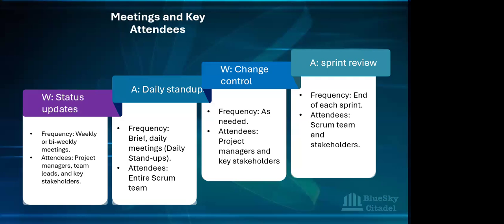That's the difference between Agile and Waterfall. There isn't a set time box for status updates. I've been on some meetings that could be up to an hour, giving status updates. Whereas the daily stand-up is time boxed at 15 minutes.